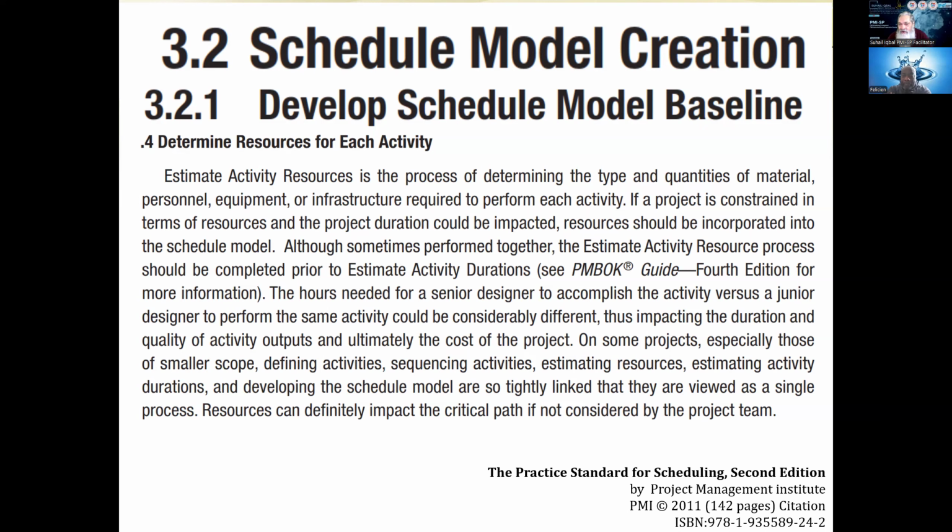Because an activity is a unit. You can't say after the start of the activity, we will deliver you this thing. If you deliver me 2 days later, how can I start? Got it? So an activity is not a very big thing. It is a 3 or 4 day thing. So all the resources required for that activity must be provided before the activity starts. I'm not talking about the whole project. I'm just talking about an activity.